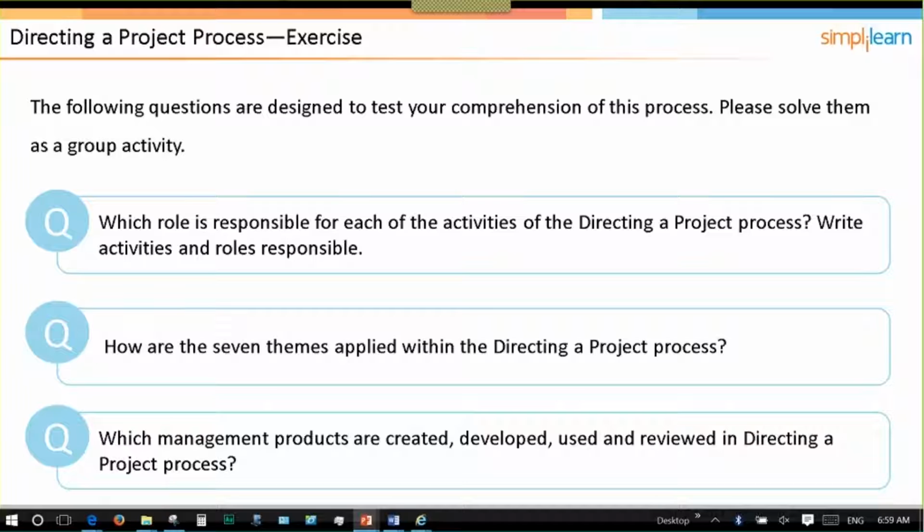And you're actually going to find that for the remainder of the processes. So good exam tip here. The only PRINCE2 process that has shared responsibilities is the startup, which is shared between the directing and the project manager. So the board and the project manager work together on that. All of the other processes are owned by, or the responsibility lies with, one of the management levels. So it's either the delivering at the team manager, or it's the project manager, or it's the project board, or it's program level. So only the startup process shares responsibility across two of the groups.